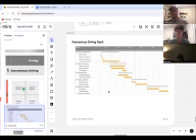So this is our Gantt chart and it shows the implementation of fully autonomous driving broken down into 5 different phases, and in each phase there's different steps. So the first phase being research and development, and in the research and development is going to be the prototype phase, and that's going to take up most of the time in the research and development because before you can start developing software and implementing it into cars, you got to get a prototype out there.